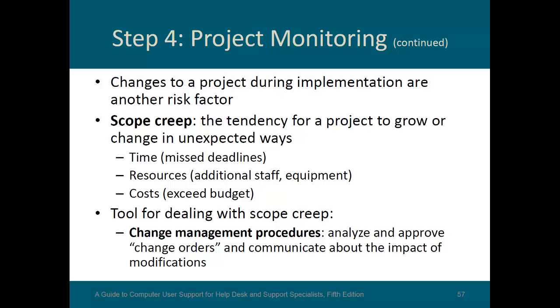So scope creep, this is something you really have to watch out for if you are in charge of a project. And that is the tendency for a project to grow or change in unexpected ways. That could cause you to miss your time, your resources, and exceed your budget. So you have to watch out for scope creep. And if too much scope creep kicks in, then you may have to crash the project and start all over again.